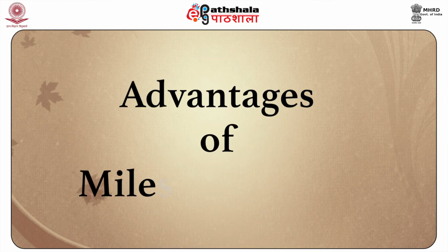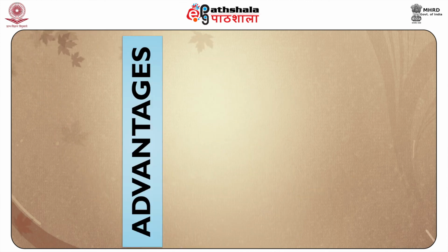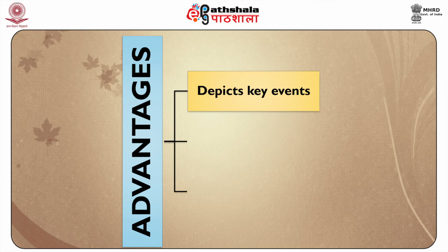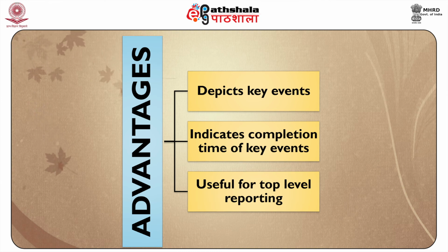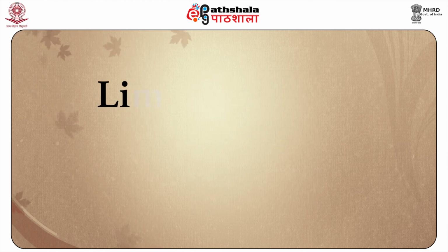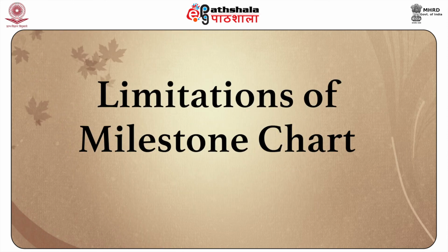Coming to the advantages of milestone chart. A milestone chart depicts key events along a time scale. It indicates completion time of a key event in a task. Milestone charts are useful for top level reporting, so management does not become bogged down in the minute details of the project. Of course, there are some limitations of milestone chart.